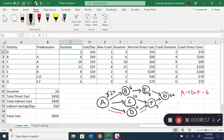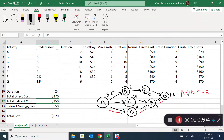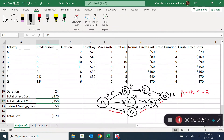The indirect cost goes down to 350, and in total my cost is now 820 dollars compared to 850 before. So I was able to reduce the total project cost by reducing time — shortening the project while also saving money. Now I want to see if I can go down to 23 days.